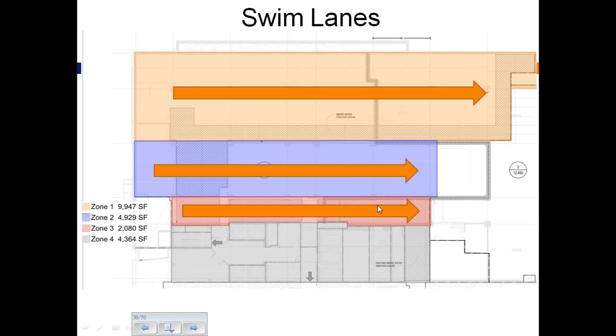The other part of this, again, we talked about an assembly line approach. You can see here we set our projects up as an assembly line and a swim lane lean approach. And back to the concurrent design model, as design goes, we're able to deal with more discrete areas, giving design more time. This was a neat project where part of the design, the owner hadn't made all their decisions.